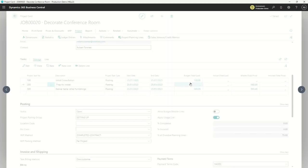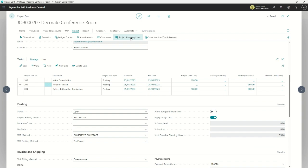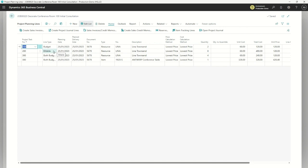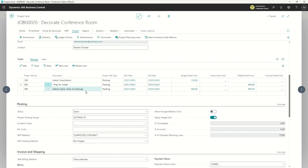Looking at another project's planning lines, you can see for line three there are two different planning lines. The first line — an initial consultation, maybe a sales call — is just budget: I'll accumulate costs but not invoice the client for that initial consultation. The second line is purely billable: I'll just invoice the client with no cost accumulation. And for the third phase it's time and materials — I accumulate costs and then bill the client those accumulated costs. So you can have many types of projects recorded here.